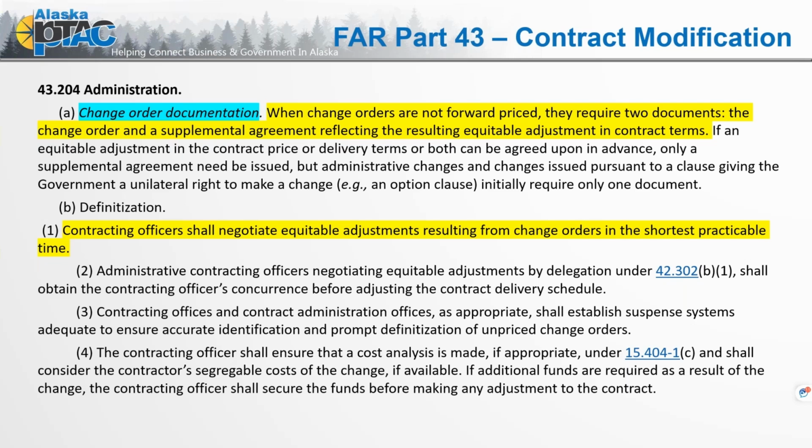Is this something that we can take a couple of days to decide, or is this potential change something that is going to hold everything up and we can't move forward? So if we can let the contracting officer know, one, we either do have a price of the potential cost or we will get that to them shortly, but two, what is the timeline to make sure that we don't have a significant delay in impact? Because that allows the contracting officer to prioritize their desk.